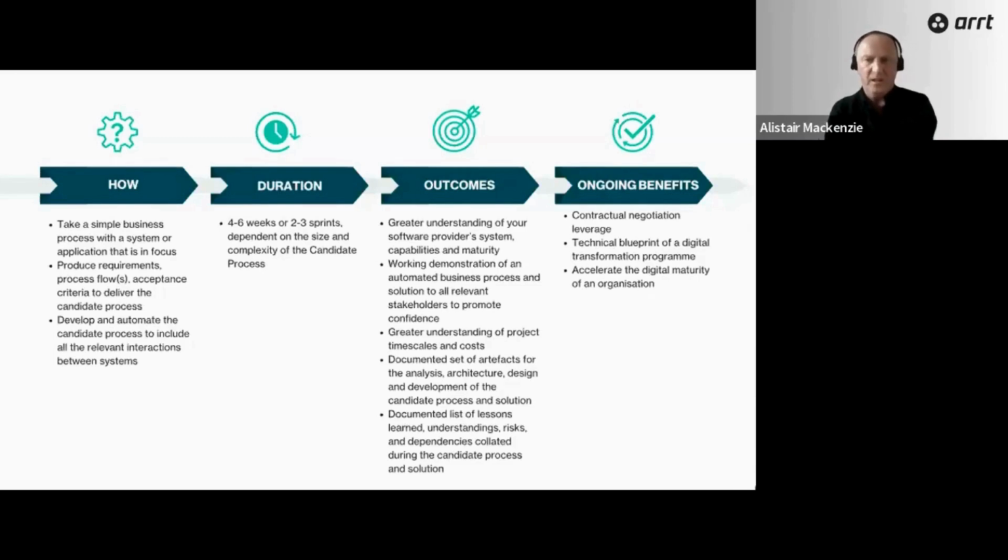Now, what you've really done there is, when you start integrating with these applications or solutions, one of the key things is, when we go to the software provider and say, can you give us a development environment? You wouldn't believe how many times that becomes a problem. The fact that they can't readily spin up a development environment or a test environment is pretty critical to your project.